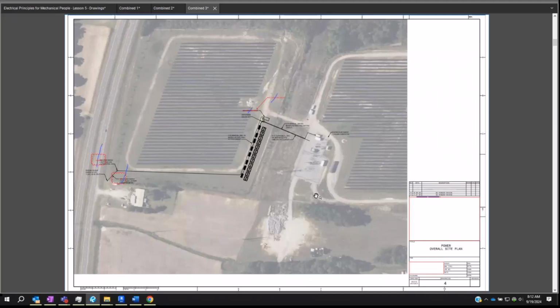The reason I point that out is because what happens most of the time is when the general contractor, who's above all of them, gets the entire stack of plans, architectural, mechanical, electrical, plumbing, structural, civil, the whole nine yards, they will go to the civil plans, rip them out, hand them to the civil contractor. Electrical plans, rip them out, hand them to the electrical contractor.